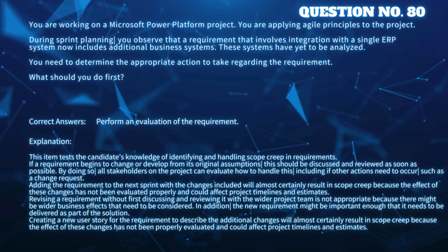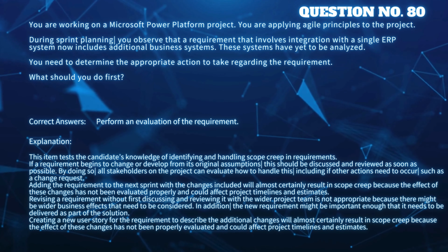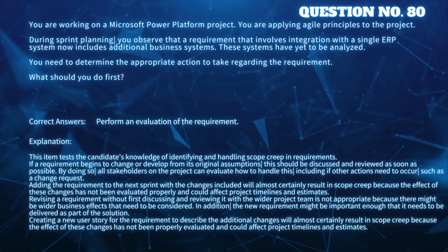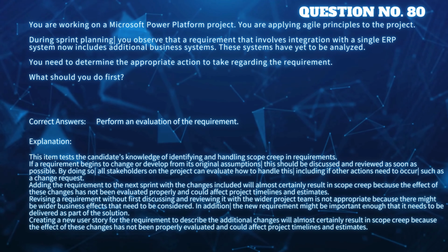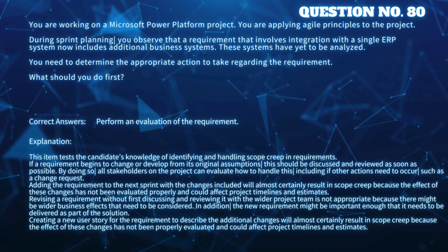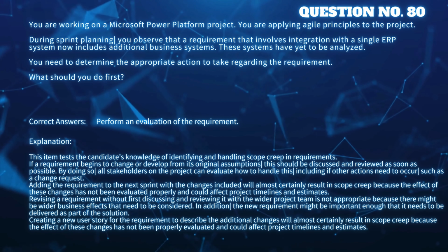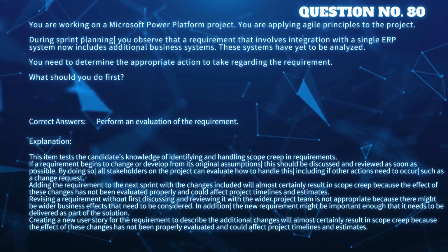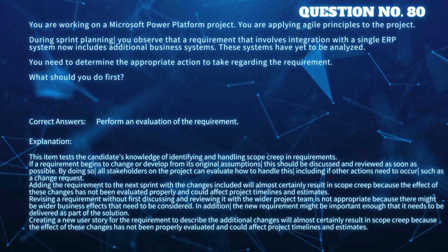Explanation. This item tests the candidate's knowledge of identifying and handling scope creep in requirements. If a requirement begins to change or develop from its original assumptions, this should be discussed and reviewed as soon as possible. By doing so, all stakeholders on the project can evaluate how to handle this, including if other actions need to occur, such as a change request.